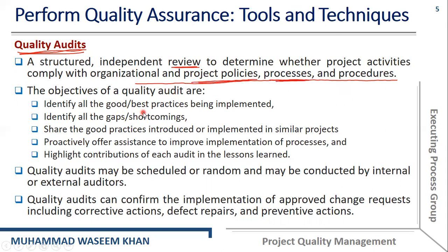identify all the best or good practices that are being implemented, identify all the gaps, weaknesses, or shortcomings in the quality of the different processes, and share the good practices introduced or implemented in similar projects. So the good practices regarding quality that are performed in different activities must be introduced and implemented in similar projects.